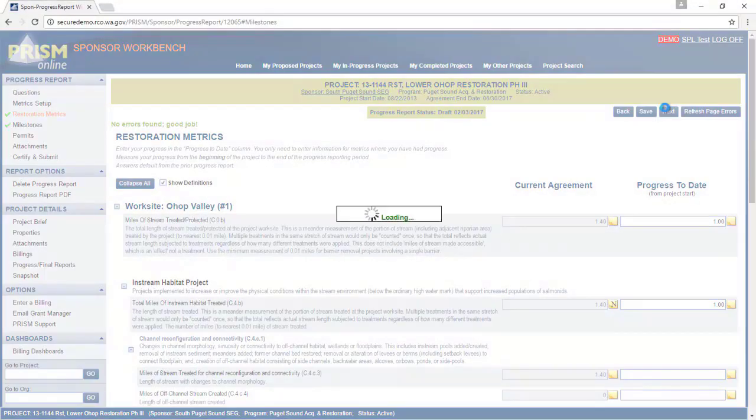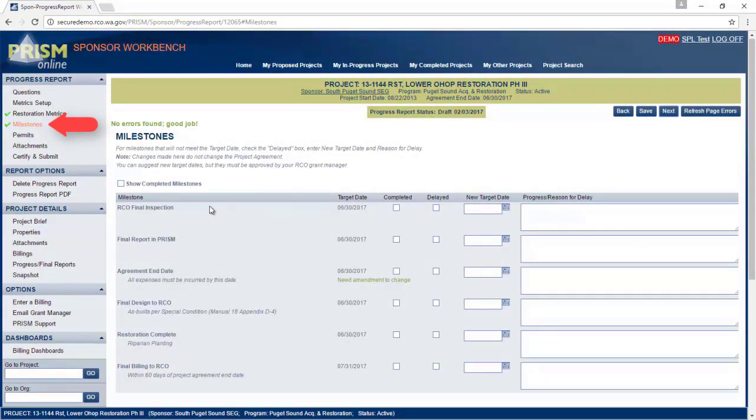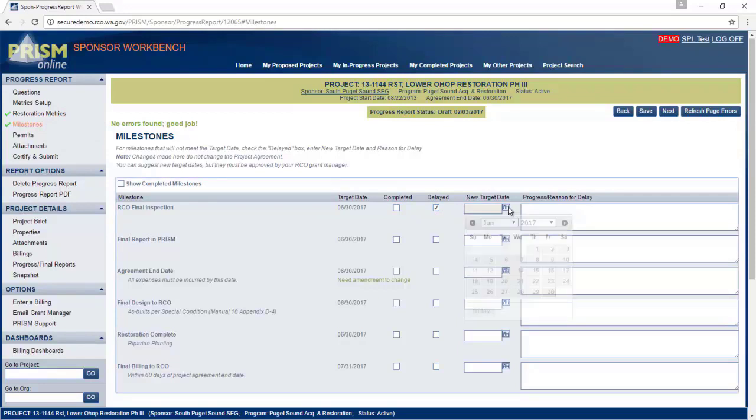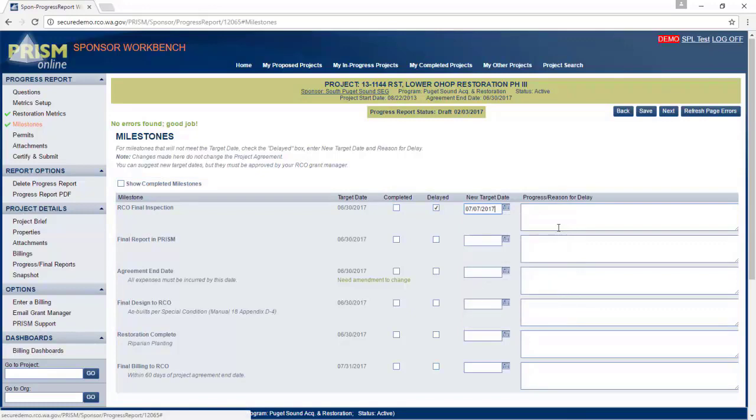Let's go to the next page. If one milestone is completed, check this box here. If it's delayed, check the box here, put in a new date, and enter a reason.